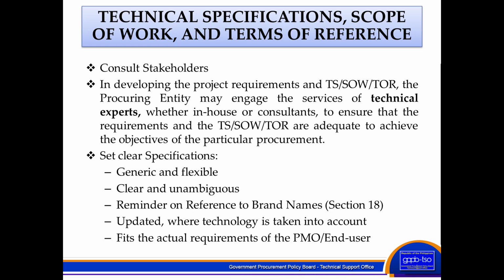Say for example, you need to buy a paint, you cannot specify a certain brand such as Boysen or Davies or Rain or Shine. Similarly to other materials or equipment, like buying a vehicle, you cannot really specify the brand names.